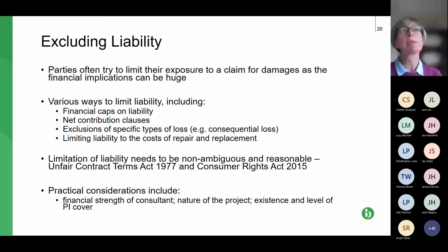It will not matter that your tender was submitted on that basis. That is because typically the tender isn't appended to the contract. Also, typically there'll be a clause in the contract that's signed that says this is the full contract between the parties. No other documents that have passed between the parties are relevant if they're not appended to this contract.